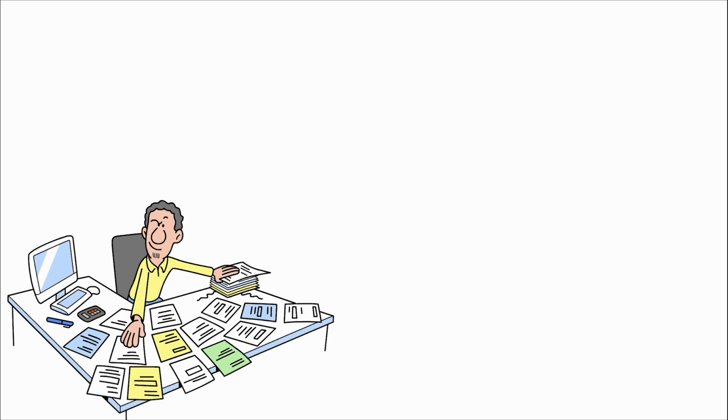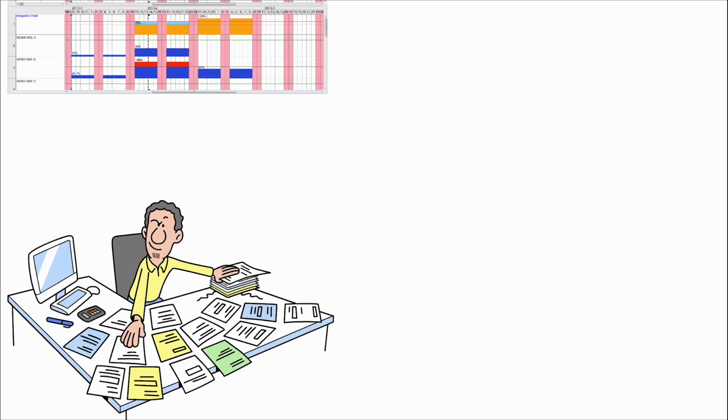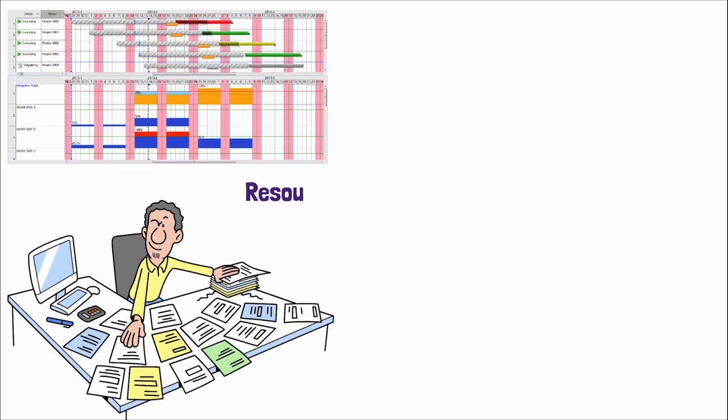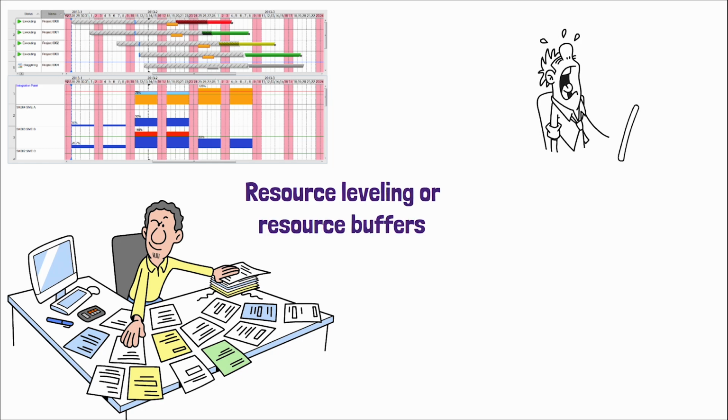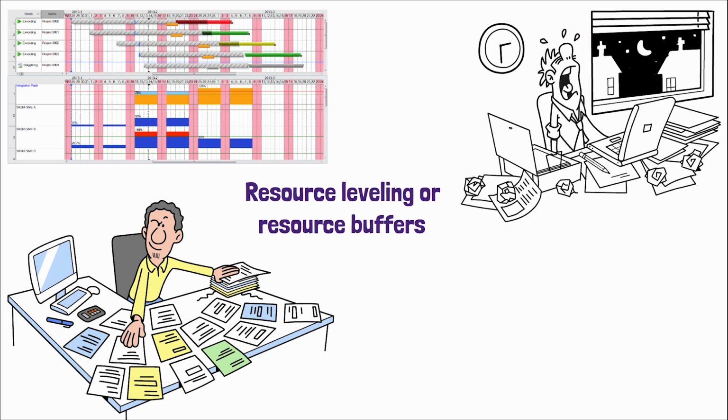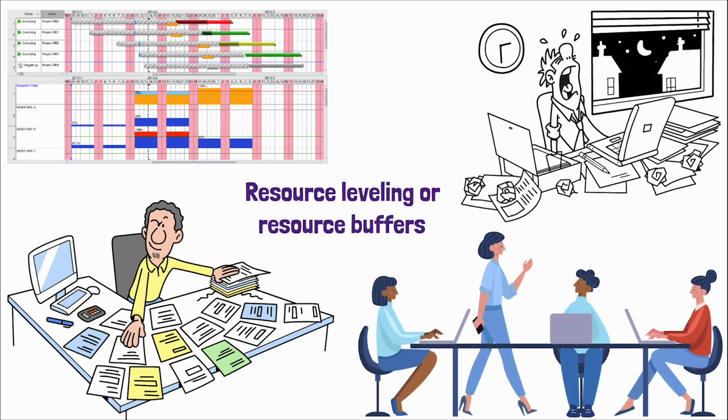Finally, the issue of queuing, akin to waiting for the tides, can be addressed by staggering project start dates or employing strategies such as resource leveling or resource buffers. This ensures that our resources are not overburdened, allowing for a steady and sustainable voyage towards project completion.